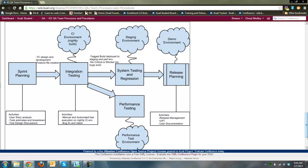Not everyone knows there are different types of testing during a software development lifecycle. Whatever methodology you use — Waterfall or Agile — we tend to use Agile. That means we have chunks of time where we plan out and take some pieces of work, and the development team, BAs, and testers decide how much they can do in a given timeframe. We do two- to three-week sprints, which means we complete that chunk of work in that given time — all requirements, all development, all testing.